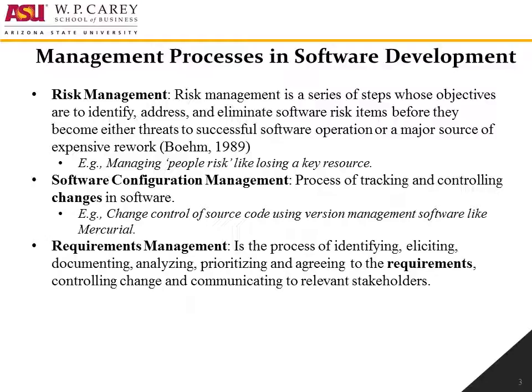Then we have software configuration management, which is basically the process of tracking and controlling changes in the software. It can be called SCM as well. SCM practices include revision control and establishment of baselines. If something goes wrong, SCM can determine what was changed and who changed it.